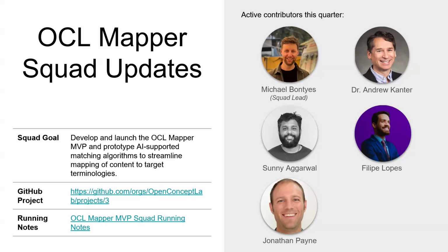So the goal and the timeline that we have within this, actually it's a 4 month MVP. Starting in February, and we are aiming for a beta release in early Q3 25. And the goal of this MVP is to have a UI and an API that is available for everyone to find and match the terms. So far we have the V1 of that working. The UI is in testing but available. We also have the API being built by Sunny.